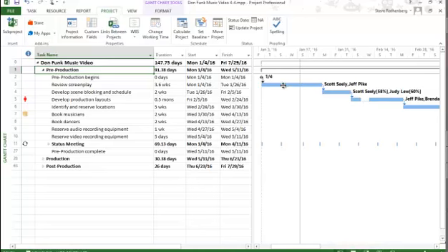So when we talk about linking tasks, we're taking 2 tasks and deciding how they are related. You might think that finish to start, where one task is finished before the other one starts, would be the normal way things work, but there are many cases where you have 2 tasks that can start at the same time. There's no reason to wait for one to finish before the other can start. In other words, they can work in parallel.